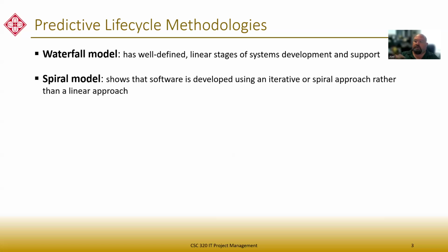And now block two comes along, and I use the same methodology to do block two. Well, then that would be a spiral because now I come back to the beginning of what that project would look like and I do the same steps again, but just for the next version of the release. So I'm repeatedly doing the same kind of thing. It's like a waterfall model that's turned back on itself and just goes round and round and round in circles. Okay. So that would be spiral.